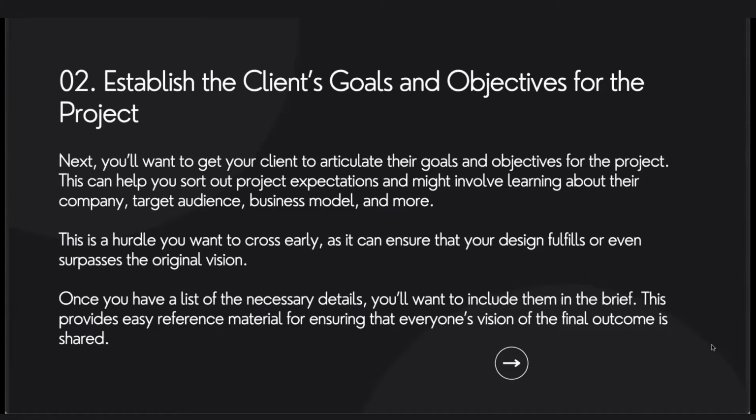It could be in the beginning of the process where you even close the sale. Truly understand what their goals and objectives are and relay that message in detail to us to provide you with a quote. Because if you leave out certain things that are really important, and we provide you a quote, and then we're doing the actual campaign for the client and you forgot to include some of their goals and objectives, the client is going to say, well, wait a minute, I expected this and I expected that. Now it becomes a problem after the fact, right?